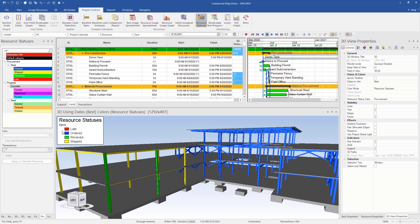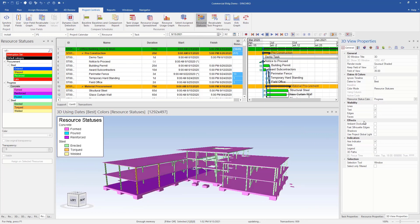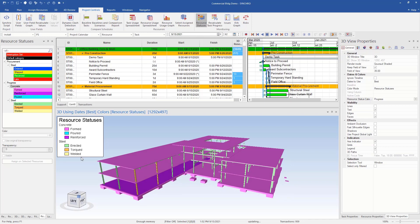Just by looking at this, we can tell by the colors. So now if I switch over to progress, I can see here that everything has been formed and I have one slab that's been reinforced.